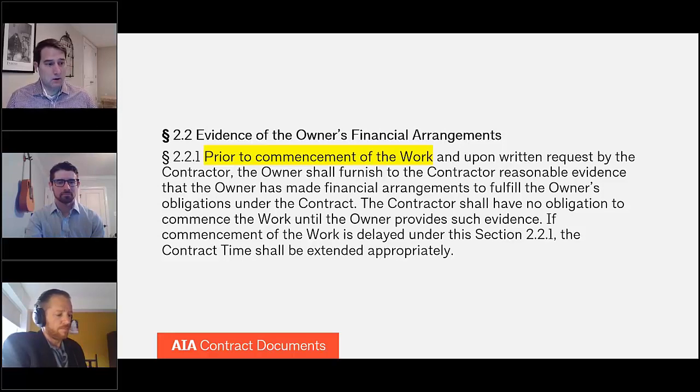And if you think about it, even another level down, the subs are probably even more extended because they've had to submit their billing to the contractor, then the contractor processes it and submits it to the architect and owner for certification. So it is really just a fair process by which the contractor can assure itself, at least to a reasonable extent, that there are funds in place for it to continue doing its work. Yeah, good point. I agree entirely.